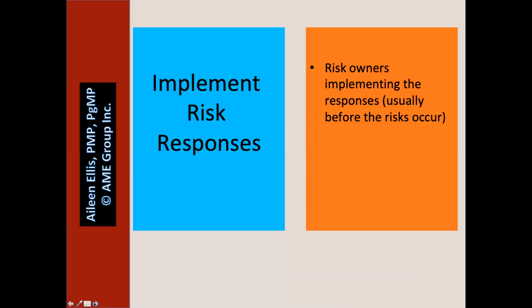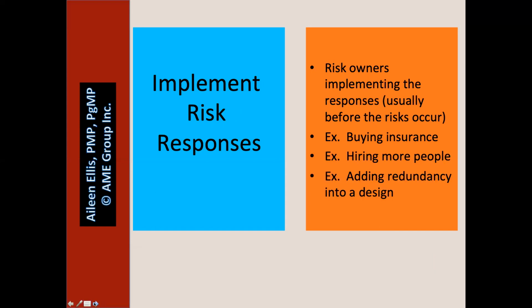Implement risk responses. It's the risk owners implementing the responses, usually before the risks occur. Examples, maybe they're buying insurance, hiring more people, adding redundancy into a design.